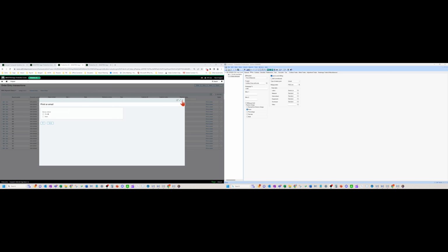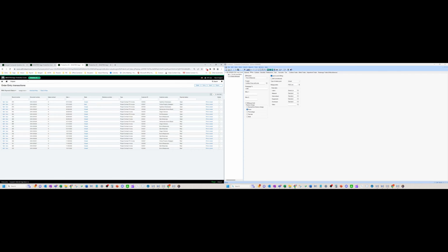And now I'm going to show you in Sage 300 what it takes to do the time and material billing on a contract, and if you need to make a change, what that entails. Okay, so over here in Sage 300, we have a time and material contract up. So first thing in Sage 300, you do have a slight difference in here. You put all of your time and material to one line item, and you have your different rate tables for your different types of categories assigned here on the one line item.